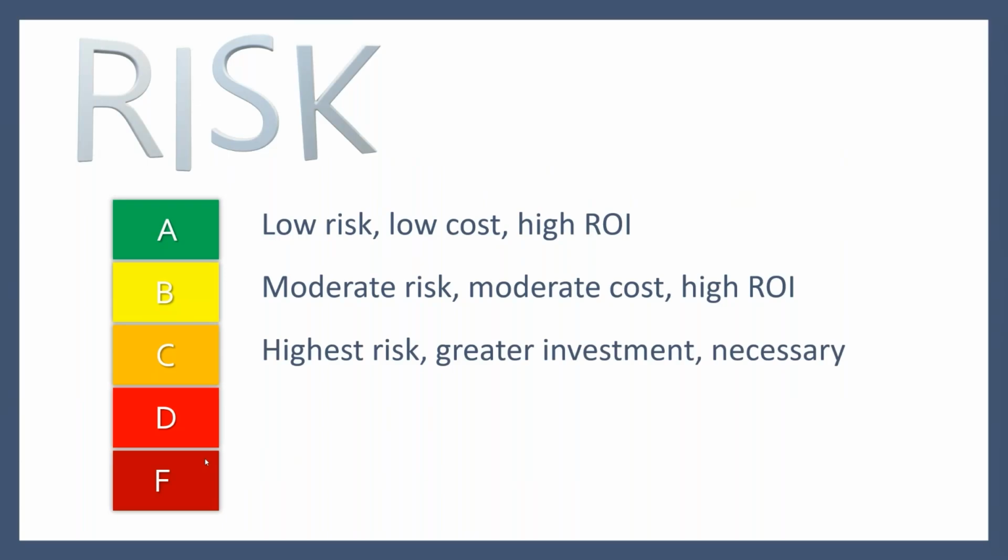When I get to this critical roadway, though, it's really about to hit that inflection point and go downhill quickly. This is where you see the highest risk if you do nothing. It is going to take a little bit more of an investment, but it is necessary at this point. If we don't get something corrected before we pass the inflection point on that curve, then it's going to get really expensive. We're going to have to do some major construction and maintenance activities.